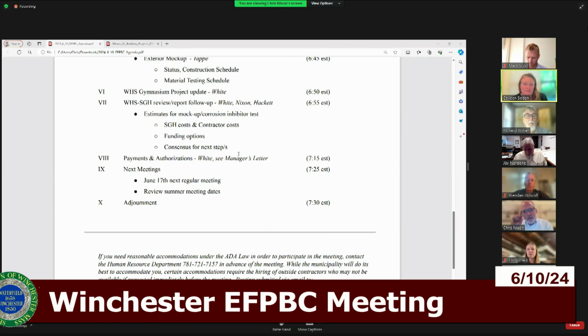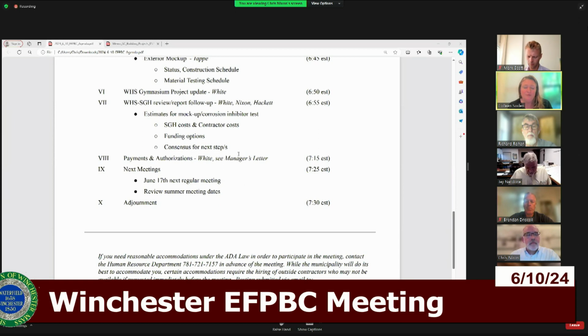So I think everyone knows that we're participating in Eversource Path 1 Zero Net Energy Performance Incentive Program. The way that the program works is there are two distributions of funds, one post design, and the other post verification. We solicited, or Ken and Meg did, a proposal from Element Lalek to be the verifier of the EUI performance for the first 12 months. It involves reviewing the control sequences and the energy use demand for the entire building, and sorting out any discrepancies between that and the energy model, to see if it's an occupant use piece or something going on with systems.